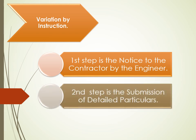The second step is the Submission of Detailed Particulars. The Contractor is to submit detailed particulars to the Engineer within 28 days, or another agreed period, of receiving the instruction. This includes: the description of the varied work performed or to be performed, including details of the resources and methods adopted by the Contractor; the program for its execution and the Contractor's proposal for any necessary modifications to the Program according to Subclause 8; and the Contractor's proposal for adjustment to the Contract Price by valuing the Variation in accordance with Clause 12 Measurement and Valuation, with supporting particulars.